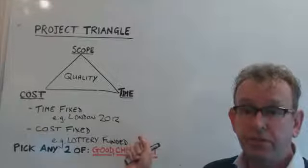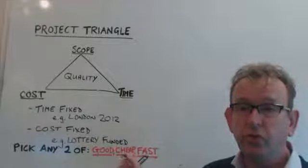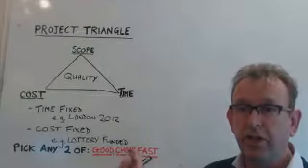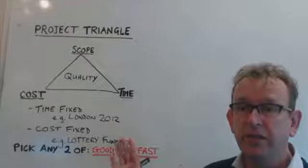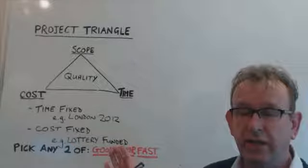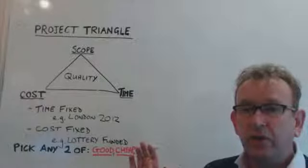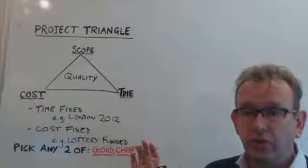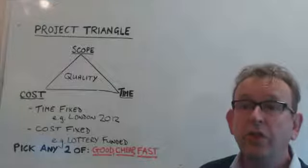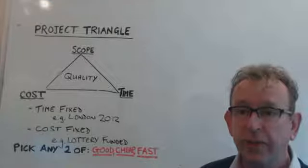Some projects are fixed by time. For example, all the London 2012 Olympic projects had a certain date by which they must deliver, and no matter what happened those projects could not deliver late. It's very useful to understand which side of your triangle is fixed at the beginning when you're setting out the project plan.